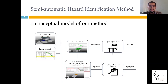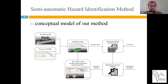A specific identification algorithm is designed and developed for identifying each of the hazardous attributes. Appropriate queries are then written on the prepared database to examine its content according to the developed algorithm and identify hazardous activities and attributes. Once the hazardous attributes are identified, they are transferred to the 4D BIM model to create the 4D+ BIM model — a 4D model enhanced with the safety information resulting from this method.